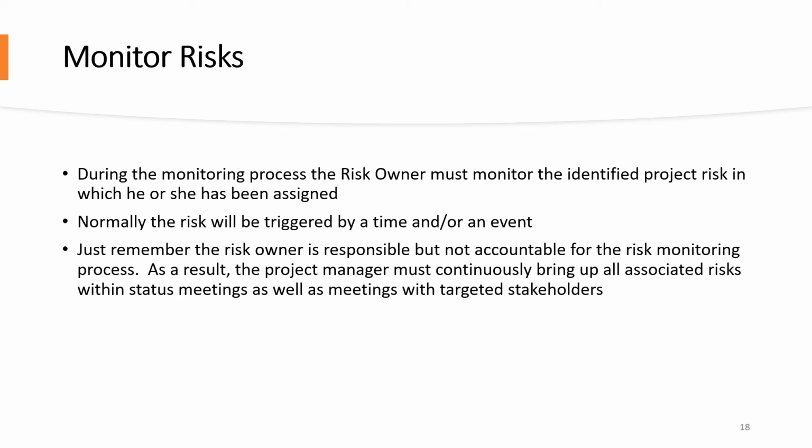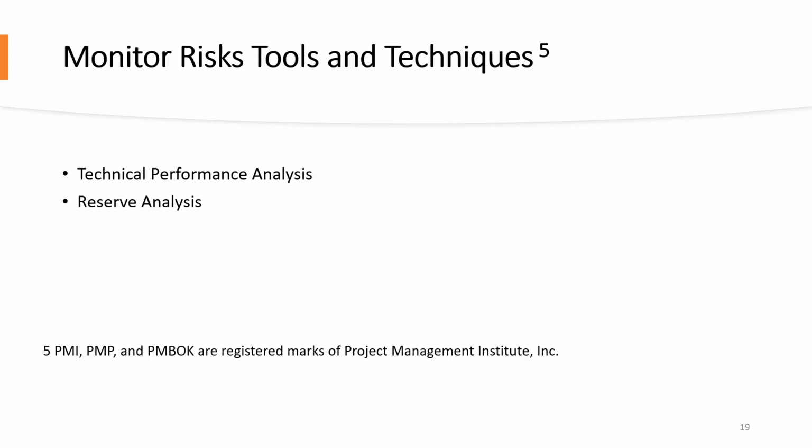As a result, the project manager must continuously bring up all associated risks within status meetings as well as meetings with targeted stakeholders. You also need to ensure your project plan employs effective communication strategies to ensure the risk owner knows his or her role, the triggering event, and proper channels to communicate in the event the trigger threshold has been met. Listed are some of the tools and techniques associated with the monitoring of risk management.